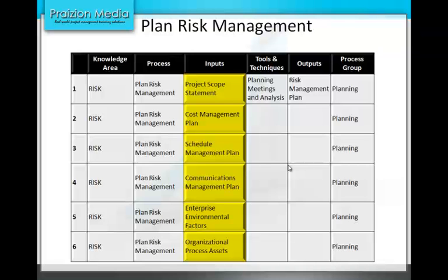Now I hope you remember where the schedule management plan was created. It was created as part of the develop project management plan process. I hope you remembered that. Your schedule management plan was not created in time management. Alright? Your cost management plan, same thing. It was not created in the cost management knowledge area. The cost management plan precedes the cost knowledge area. It was also created in the develop project management plan process.